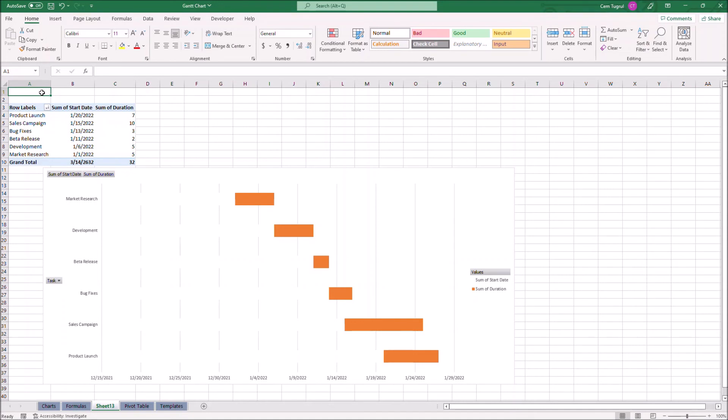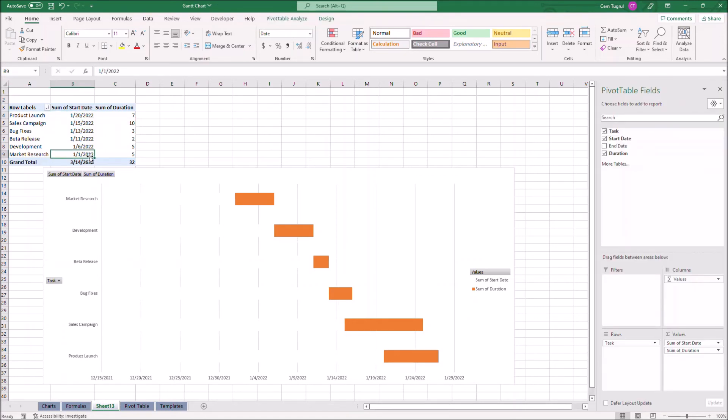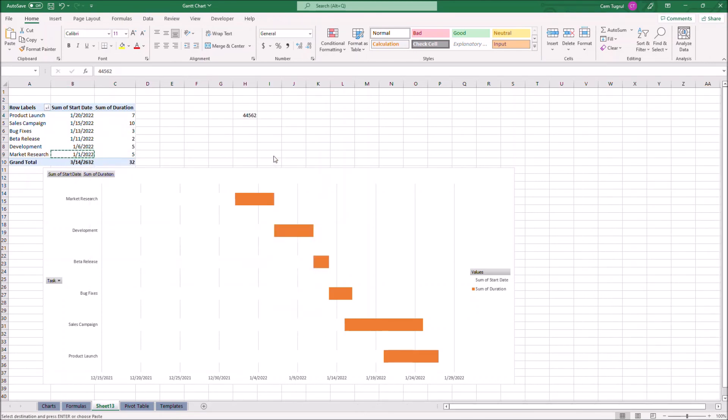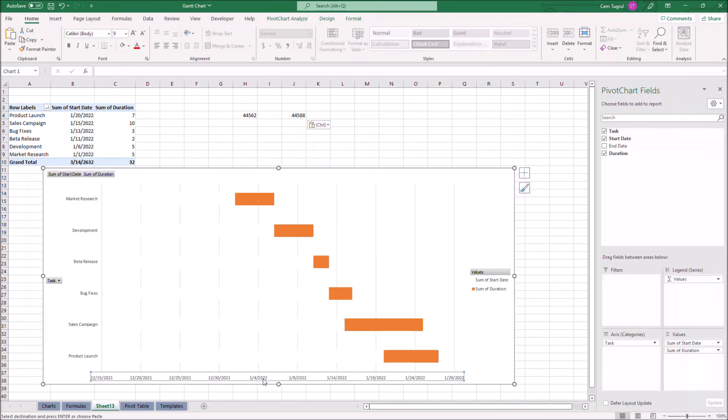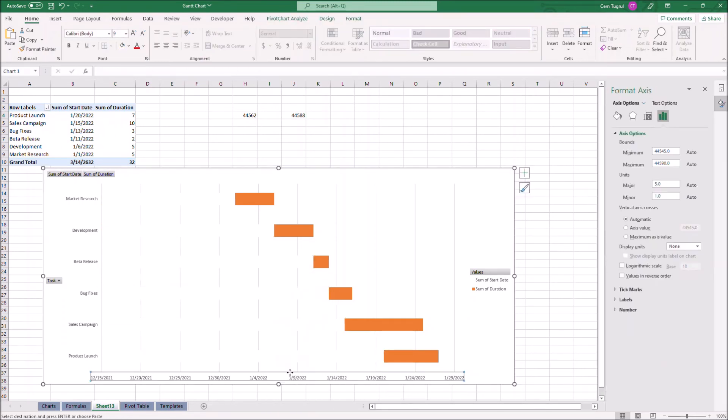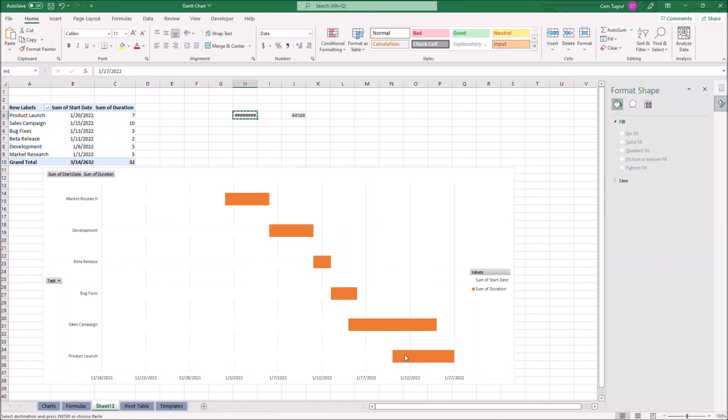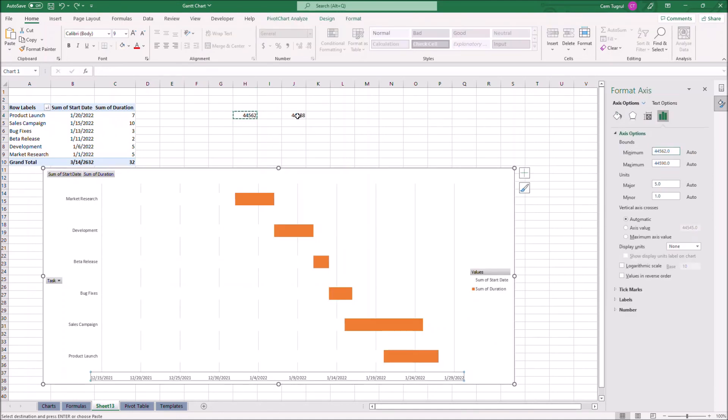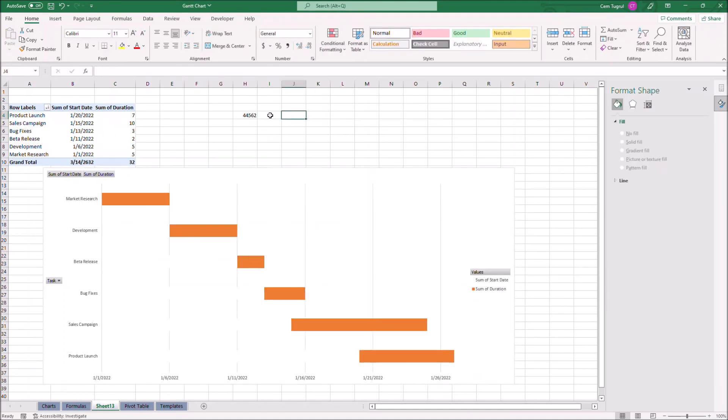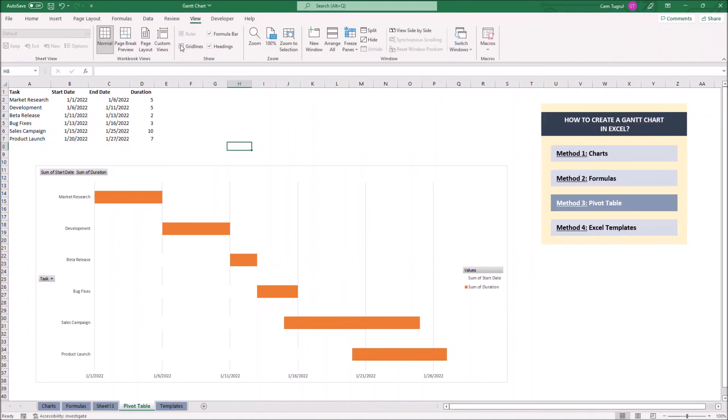We can adjust the date range of the table according to our start and end date. So we have to take our earliest and latest date, change the formatting. Let's click on the date range on the table, format axis. We can change the minimum and maximum values. And that's how we create a Gantt chart using pivot table.